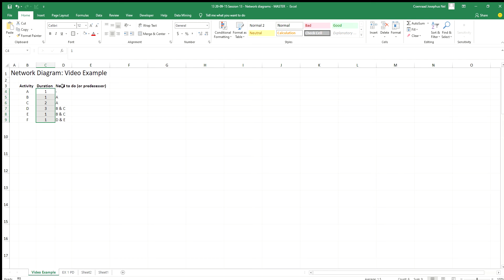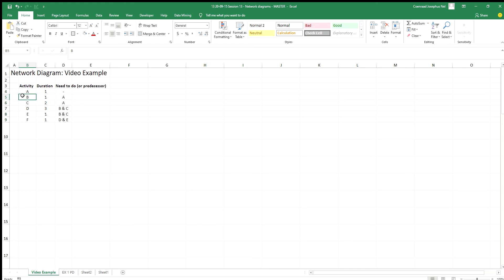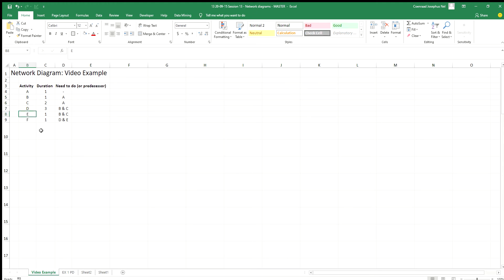Activity A has a duration of one and needs nothing before it — it's the first activity. Activity B has a duration of one; I need to finish A before I can do B. C I need A as well. D I'm going to need B and C. E I'm going to need B and C also. And F I'm going to need D and E. So this is all preset up for us.